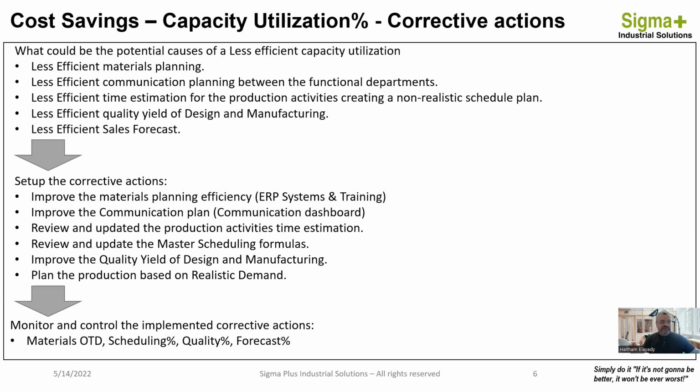And after that, what we're going to observe is that the actual hours reported and the actual cost reported of the production might be less than the budget by 25%. Those 25% could be secured from the beginning by creating a realistic budget based on the information that you have sent to the cost controller from the time estimation.